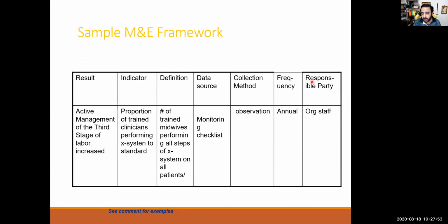Frequency is how many times you will do it. In a development project, you will have, let's say, an annual time to see how many times they distributed and how, because you have a time. But if it is an emergency project or a recovery project, depending on the period, you will say maybe weekly, monthly, daily, whatever you will write here. This is the time interval of how many times you do it. Let's say each week I will gather the information from the people who got trained, and I need this result. I have to check, which is monitoring, if that happened.